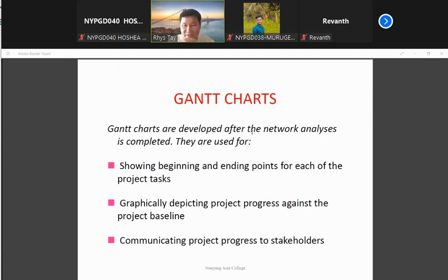So within the master plan, they break down into small projects like WBS packages. Also, they write a statement on the work on the building itself. That means statement of work or method statement. They will tell you what is expected, what the schedule is, what the things to do are, etc., etc. So this master plan is very useful.